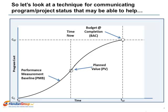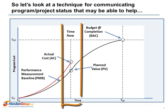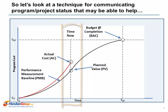When the leadership team asks for the status, in addition to the planned value, they should also be told about actual cost. If actual cost is plotted along with the planned value, the leadership team can assess if costs are in alignment with planned or budgeted spend, exceeding planned spend, or below planned spend.